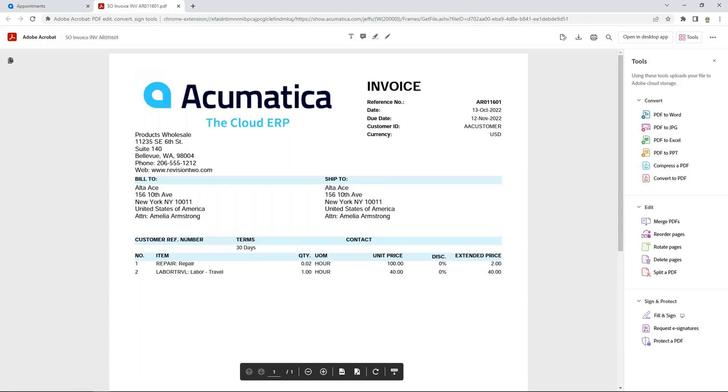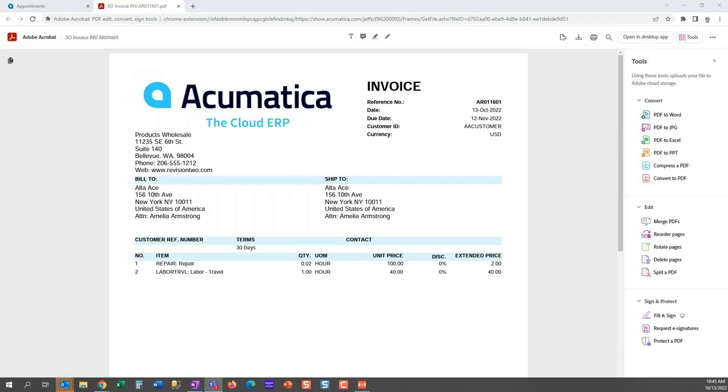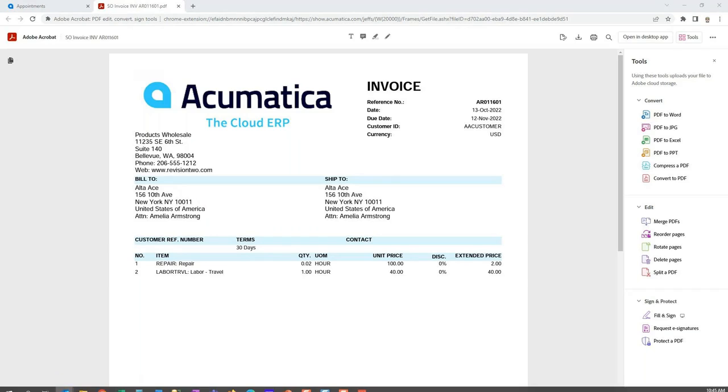You tell us where your fields are. As a part of the implementation process, you're going to show us your invoice formats and you're going to say, we really want to stick with these. So those become the output. And does that go for both projects and service? Absolutely. No limit to the number of invoice formats you can have. So when you set up a project, you define the billing relationship and then you pick the invoice format that you want to use for that job. So if you have a customer that likes to see it in a particular way, then you can do that when setting up the job. And you might have a different format for your progress type. You might have a different type for your time and material. Again, just reports to us.